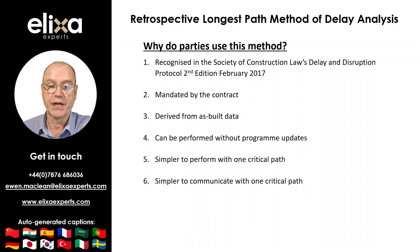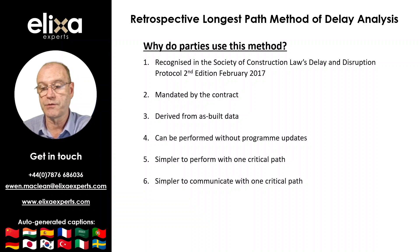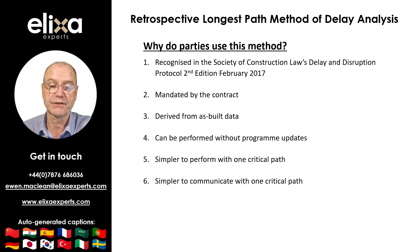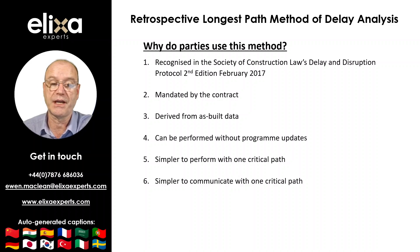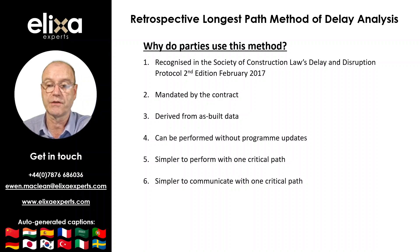The findings of the analysis are also potentially easier to communicate, whether to a tribunal, a project stakeholder, the contractor, the owner, or legal representatives, because the method only identifies the as-built critical path and does not address any switches in the actual critical path. As discussed, this can make the method less reliable in dispute resolution, but possibly satisfactory for presenting to project stakeholders who are not delay experts.